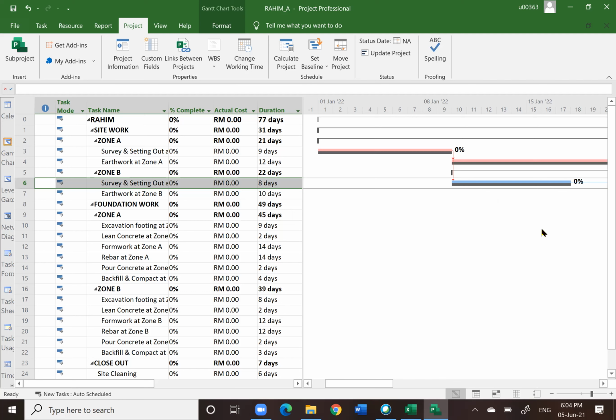Let that be the assumption. Okay, in reality, you can take a look at that time zone. So updating work is not that difficult. Basically, you need to update only what is the reality. The rest, you don't have to touch, because you already linked all those things with the predecessor and whatnot. Automatically, they will be pushed back if there is a delay. So we just want to focus on the 3 activities.